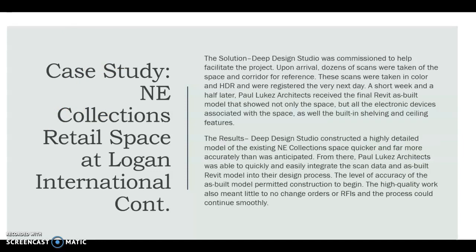So the solution: Deep Design Studio was commissioned to help with the facility project. Upon arrival, they took dozens of different scans, in color and HDR, registered the next day, which is pretty amazing. They probably had quite a good sized team working on this. A short week and a half later, the architects received the final Revit as-built model, which showed not only the space but all electronic devices associated with the base, as well as built-in shelving and ceiling features.